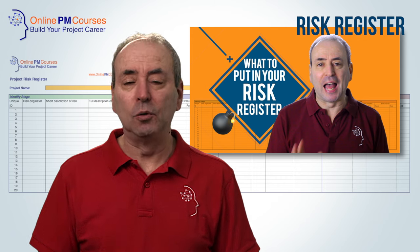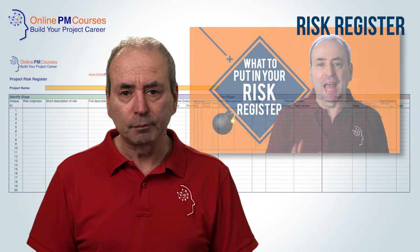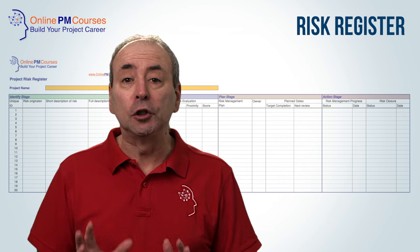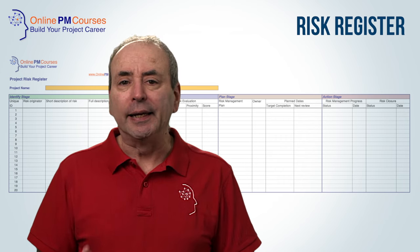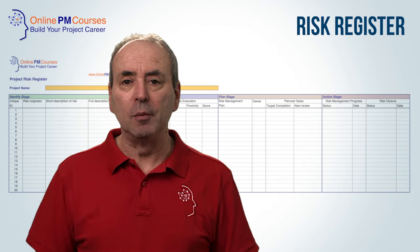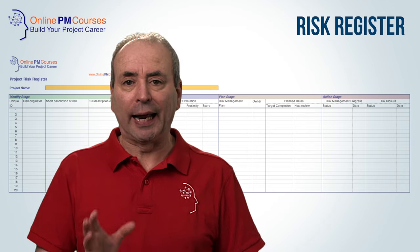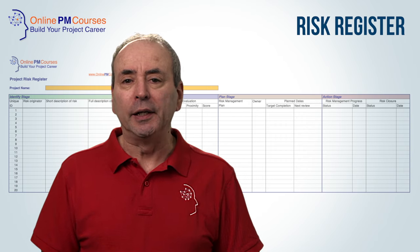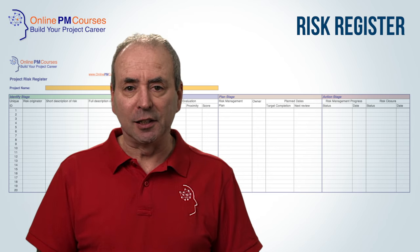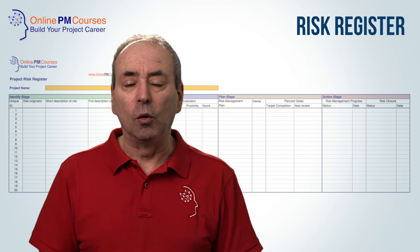The second key tool we use in risk management is the risk register — sometimes called a risk log. A risk register serves two principal purposes. Firstly, it is a management tool: we record all of our risks and all of the information about them so that we can actively manage those risks and track our progress. It's the tool we use to identify which risks we haven't addressed recently, so we can turn our attention to them.